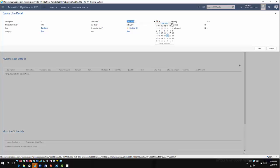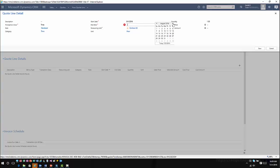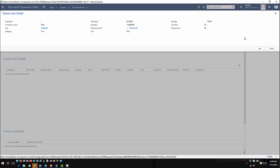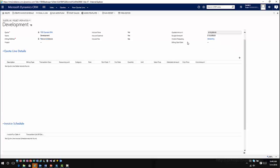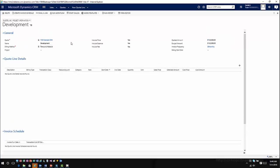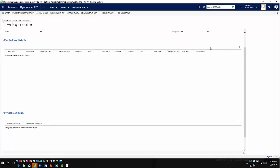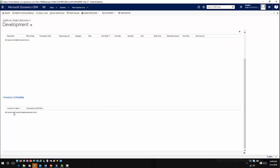The category of this is going to be a timesheet or time entry. We know the developer is going to start working on this project during a specific time, so we can define what that time frame might be and determine when it ends — probably in November. The quantity: the developer is going to work roughly 175 hours on this, then save it. Now I can see that for the details it repopulates this information as it updates, showing specifically what this quote looks like — the quoted amount, the billing information, and so on.